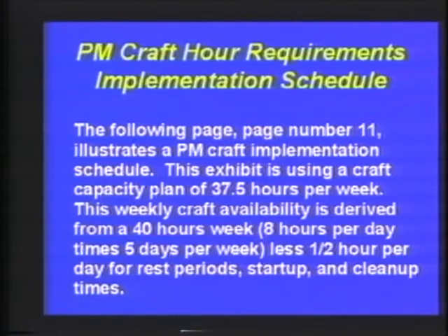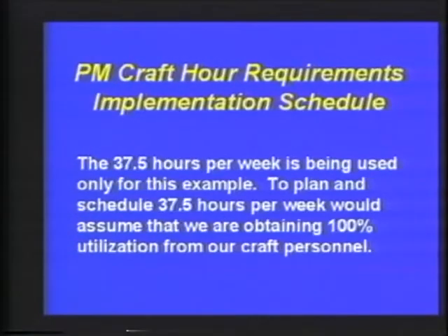Now, remember, we pay 40 hours. We've taken out our startup, our lunch, unless it's a three-shift operation. We've taken out the rest periods, and we've taken out the cleanup time. So out of a 40-hour week, I have 37 and a half hours of capacity available.